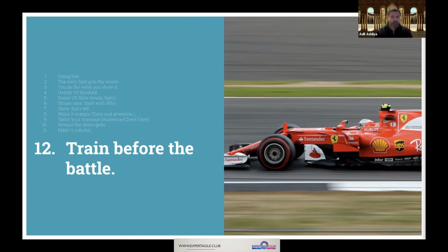And we all know that when you are showing stuff to the client, it's high stakes. You don't want to leave anything to chance, and you want to test as much of your stuff as possible. This is not a session to plan the review. At this stage, all the planning and presentation should be ready. This session should be as late in the sprint as possible, but you should leave a few hours to adjust some stuff if needed.